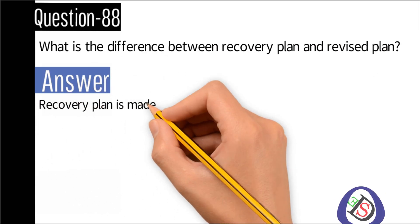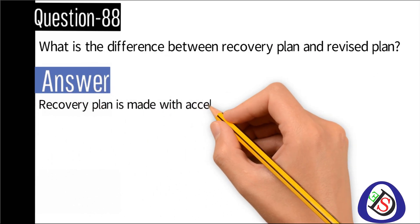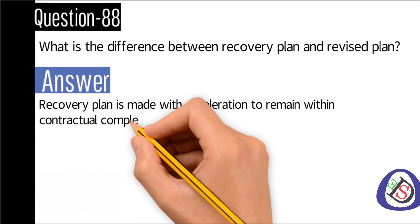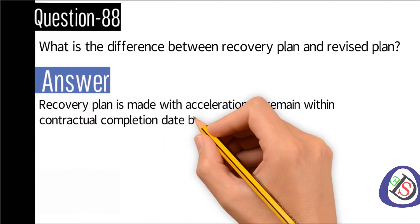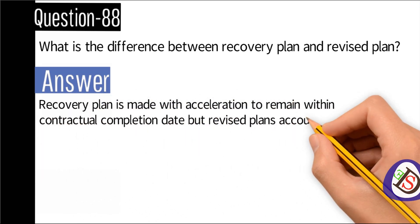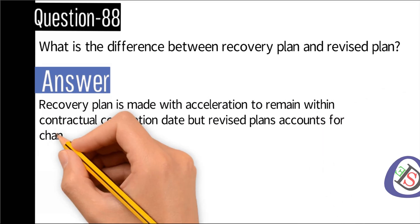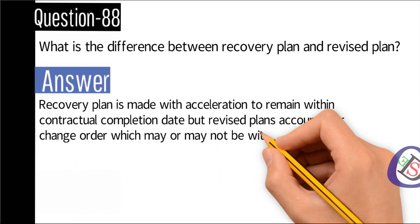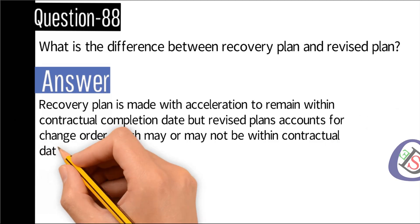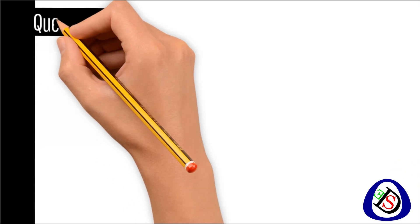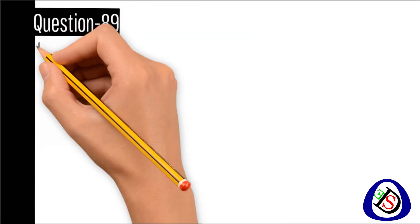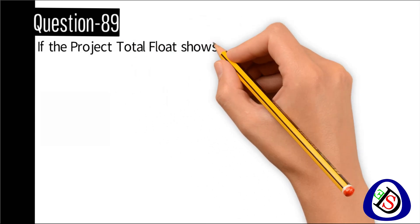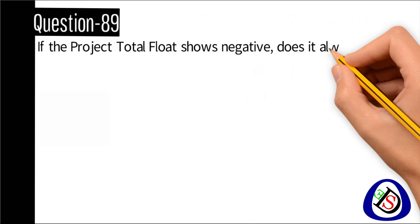Question number 88: What is the difference between a recovery plan and a revised plan? Answer: A recovery plan is made with acceleration to remain within the contractual completion date, but a revised plan accounts for a change order which may or may not be within contractual dates.